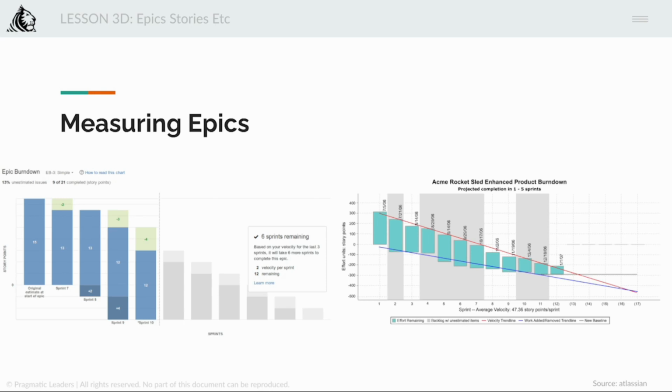Okay. So anti-patterns that you need to watch out for: epic or release forecasts aren't updated as the team churns through the work. No progress is made over a period of several iterations. Chronic scope creep, which may be a sign that the product owner doesn't fully understand the problem that body of work is trying to solve.